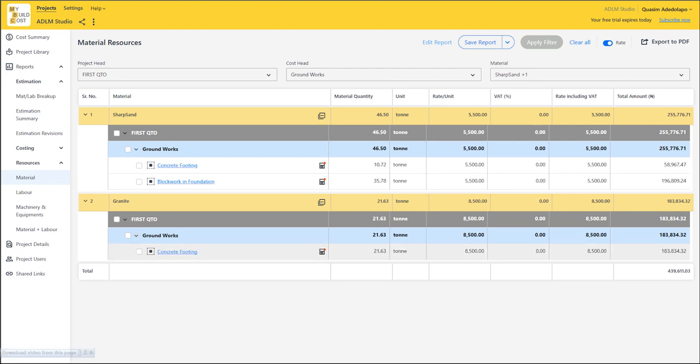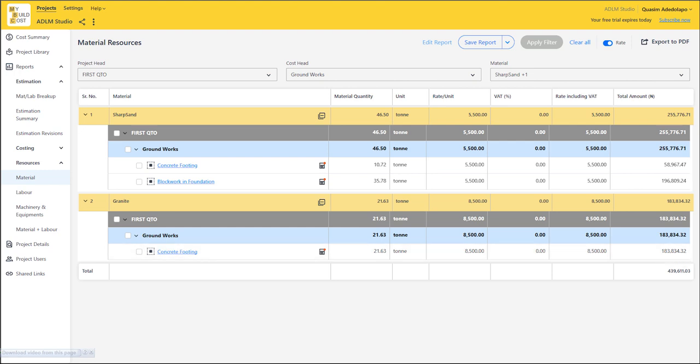With this here, we have just concrete footing, because this is the only concrete work we have in the groundwork. This is just for a strip foundation where you have your concrete footing and your block work alone. You have the summary of that cost here — the total cost is 489,611 Naira 03 kobo, and this is all based on your quantity takeoff.